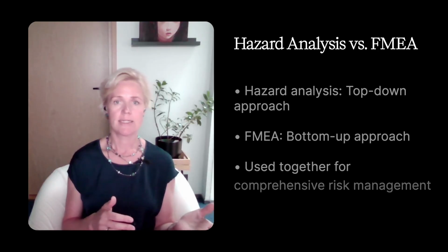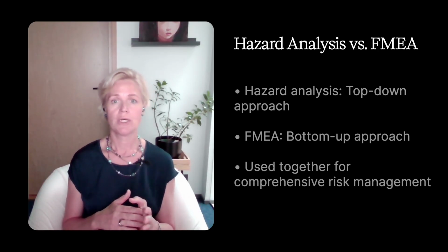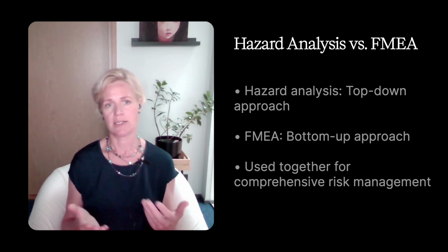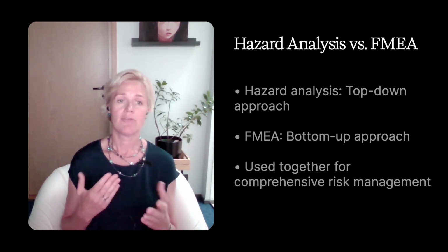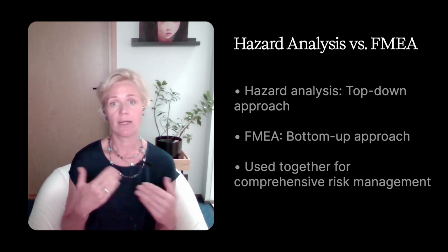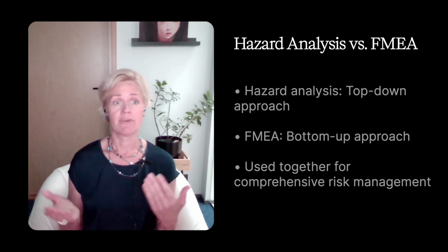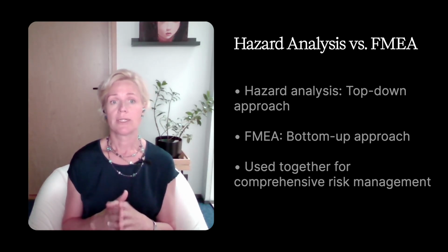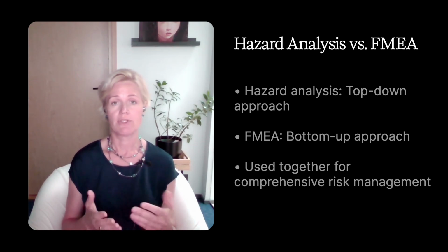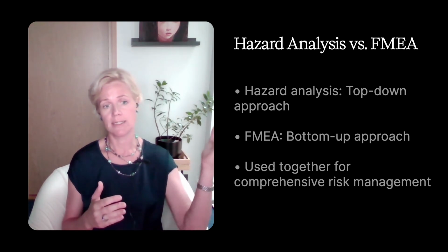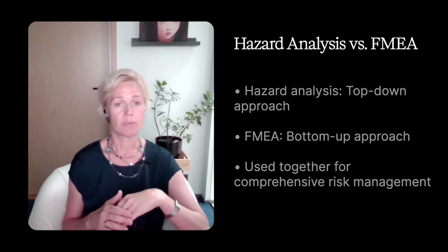While hazard analysis, which I talked about in the last video, is a top-down, system-level approach, identifying and assessing hazardous situations and potential harms across the entire product lifecycle, FMEA is quantitative, while hazard analysis is typically qualitative. FMEA and hazard analysis are very often used together to ensure that any and all risks have been identified and managed, providing the safety of the device. While hazard analysis gives you the top-down view of the risks, FMEA looks from the bottom up.